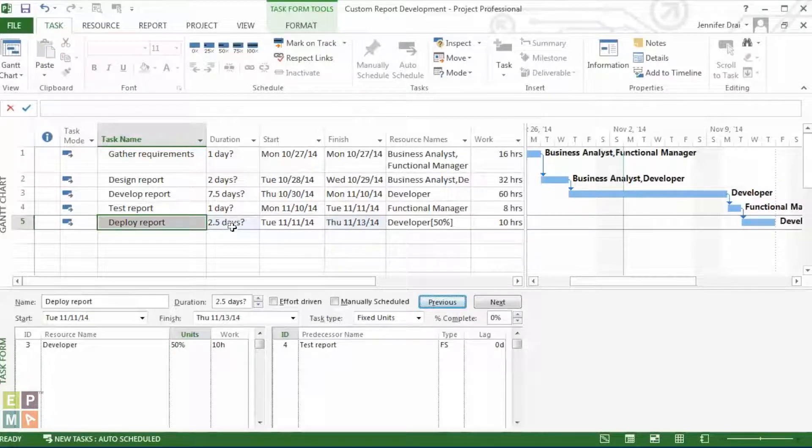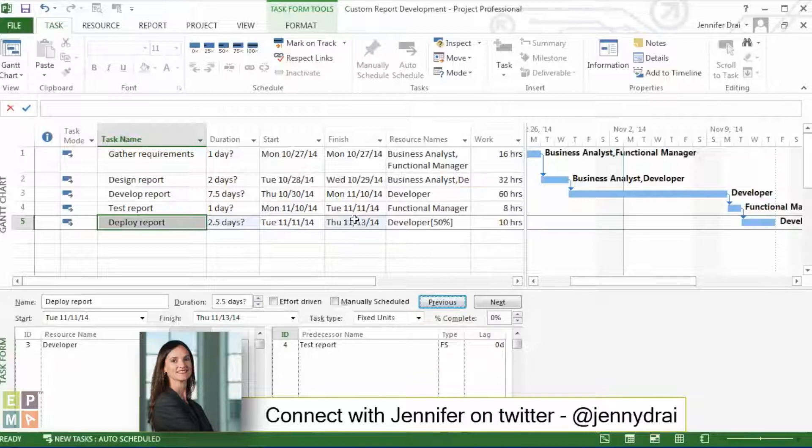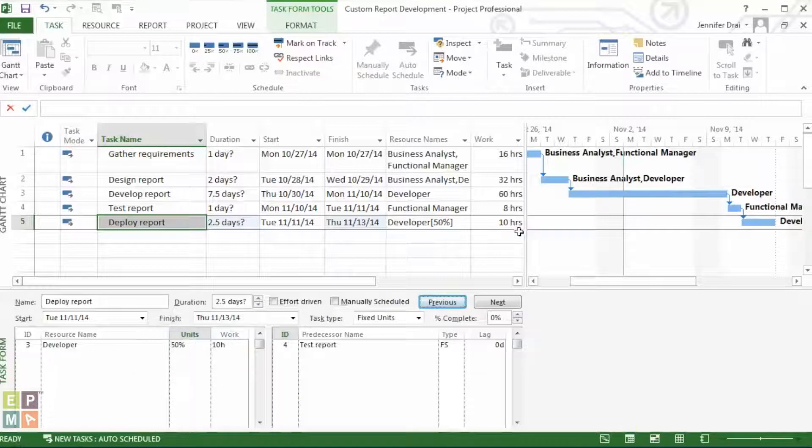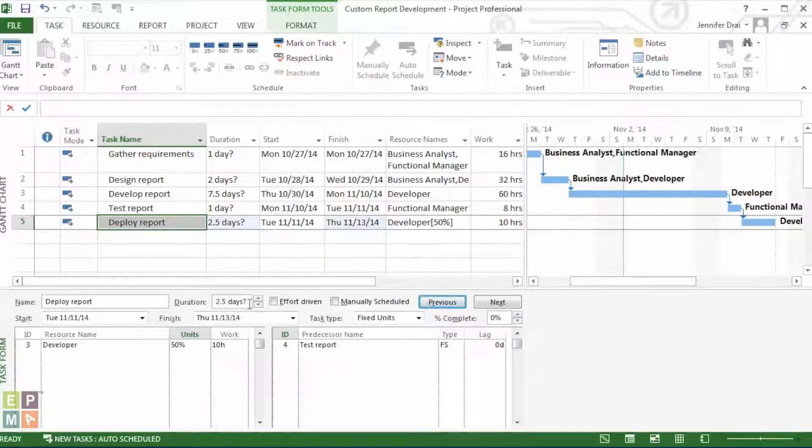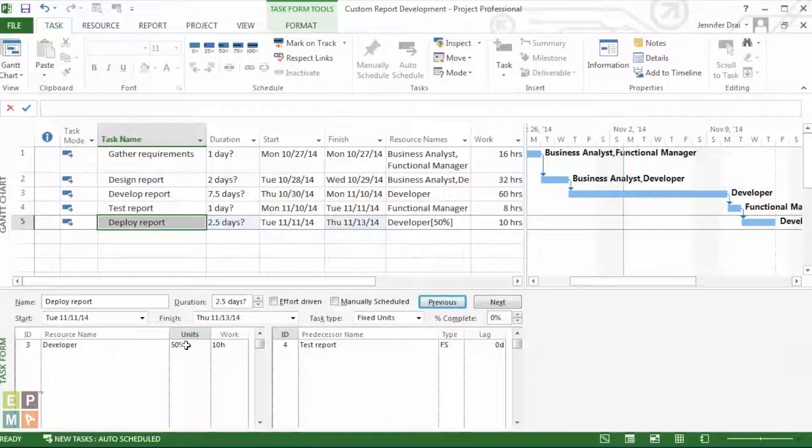Why? Because, precisely, by following this equation, it will be dividing the work hours or effort, which is 10, which we knew in advance, it will be dividing it now by 4, which is 50%, instead of 8 hours a day when we had it at 100%.